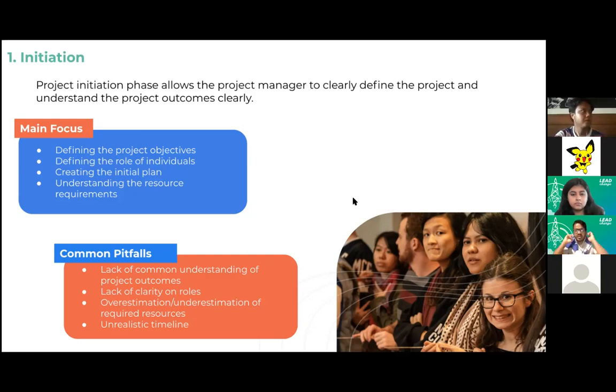We usually say there is a worst case, best case, and most likely case of a project happening. For example, if you take YouthSpeak, there will be a most likely case, a worst case, and a best case. You always need to see what my resource allocation will look like if the best case happens, and in the worst case. What is my budget? How many people? This is an estimation you need to do in the beginning so that you have a better idea of the resources you require. How many people do I need? How many partners? How many MCVPs do I need to mobilize to get this done? Things like this.